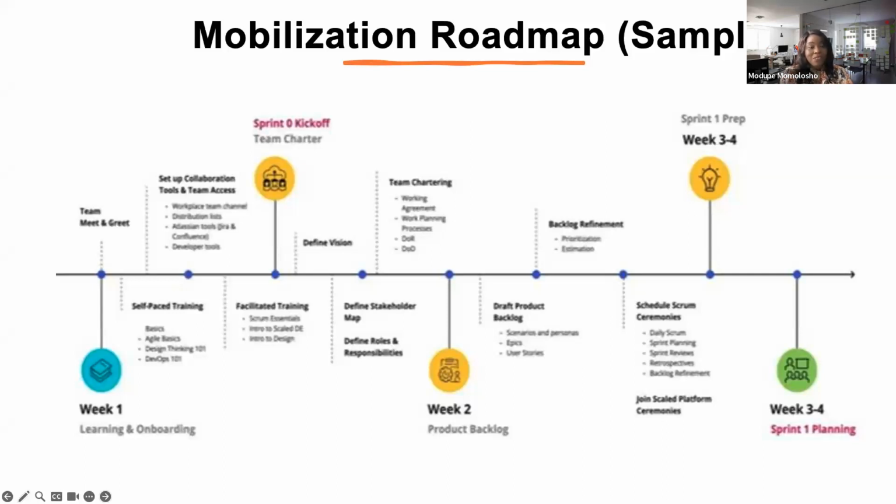So from there, when the team is chartered, you go to things like backlog refinement. So we talked about requirements from Waterfall. Imagine a team coming from Waterfall, bringing a lot of requirements in. Where do they keep those? What do they do with those? We want to bring them now and become an agile team. So as a Scrum Master, you need to guide them into how to craft user stories from all the requirements they are bringing in. That still speaks to your understanding of Agile itself, right? If you don't understand what user stories are, you can't even teach them anything. So to support that, you need to have that understanding and knowledge.